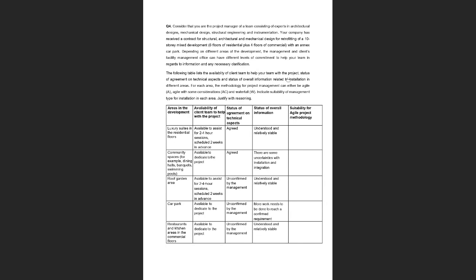Now we know that in order to be agile or waterfall, one of the important things to consider is how much time a client can dedicate to your project. We know that for agile methodology, one of the important requirements is to have frequent meetings with the client, right? So if the client is not available for discussion, then you cannot have agile methodology. You will have to follow waterfall methodology. So one of the important things to consider in this table is how much time the client can dedicate to different areas of development, and that is pretty much going to define if the project is going to be agile or waterfall.